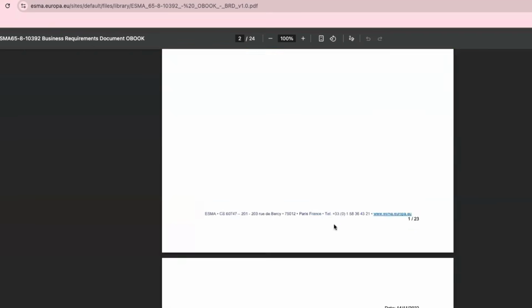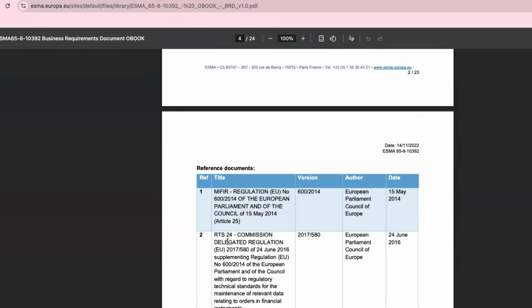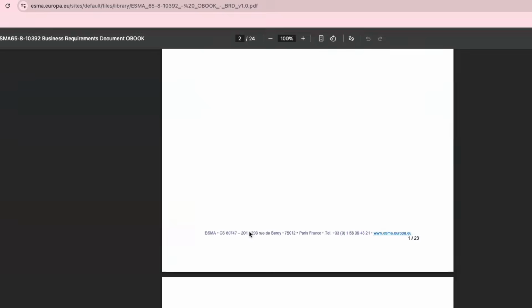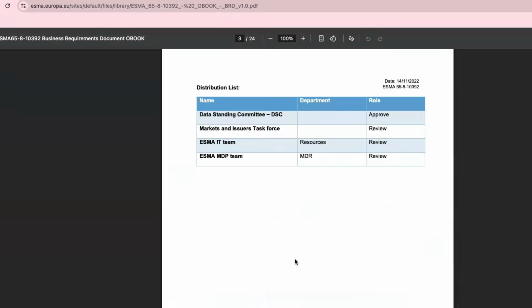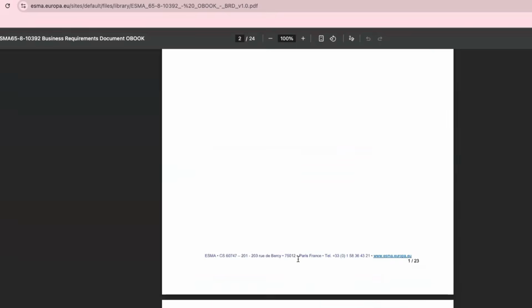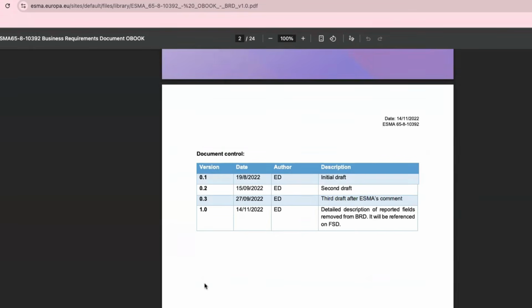Anytime you're going to add something, even if it's going to be a new line, or remove something, you're going to update it here. For example, every time I'm adding a new stakeholder in the stakeholders list, you put that date and note that you added or removed a stakeholder. You keep track of any change in that BRD, right? You're going to add it here.